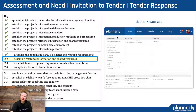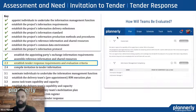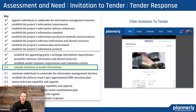Then gathering resources together, understanding more examples that we can share with people, and anything that has been done before — like content warehouses or template files — is really important. Talking about evaluation criteria: we have to establish the tender response requirements and evaluation criteria. We can expect much better responses and results if we share upfront how we are going to evaluate the answers on our exchange information requirements. And when we have a set of requirements that are very broad, it's difficult for teams to understand exactly what it means to them. Being able to filter for just specific appointments is really critical so that teams can understand what's going on for them.